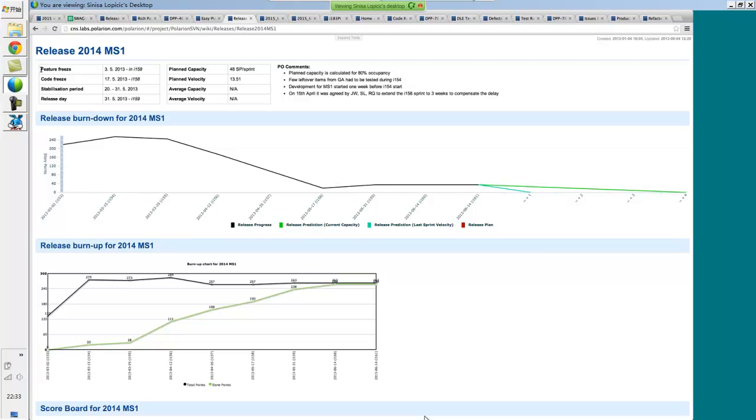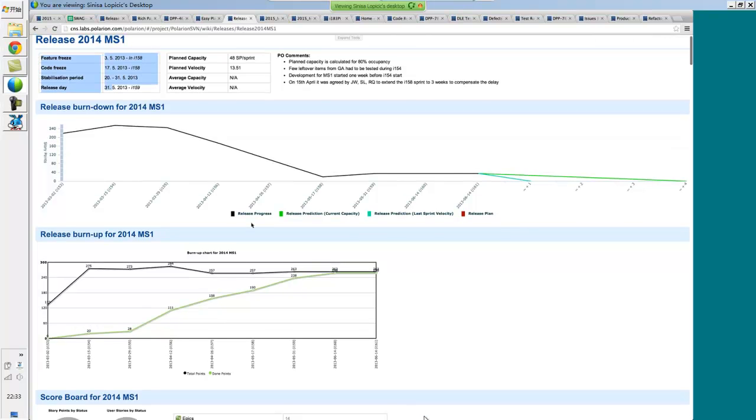But I would say 9 out of 10 sprints are set at 2 weeks. And what that means is, if there is a statutory holiday and all that, we still keep it at 2 weeks. And we usually run the sprints Tuesday to Wednesday. We used to do Monday to Friday and start. We switched to Tuesday and Wednesday because when people take time off, it's usually on Fridays and Mondays. And you do want to ensure that you have people there for the planning and assessment meetings.